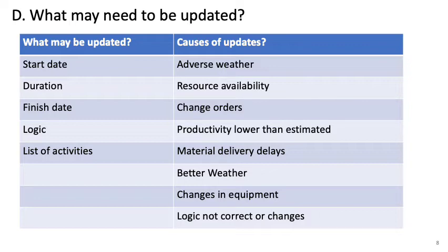And then change orders, as I said, sometimes the owner asks you to do additional work other than what is specified in the contract. So with that, more activities need to be done, so you need to add activities into the schedule.